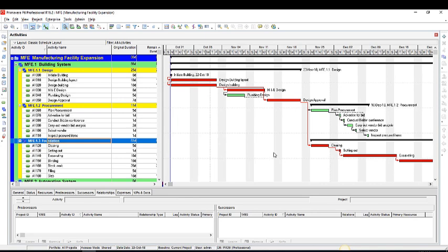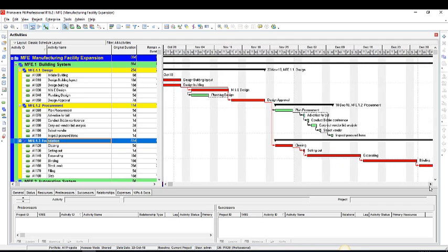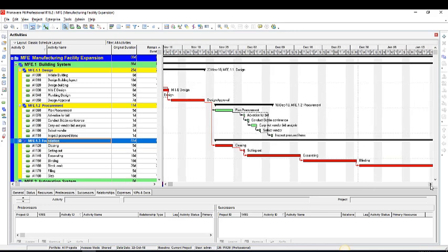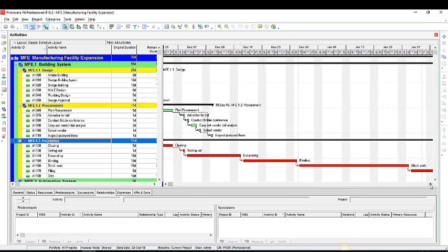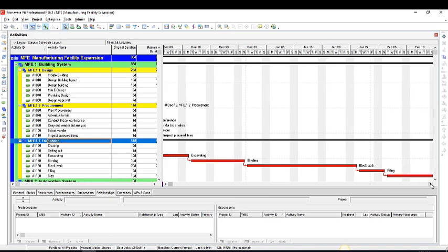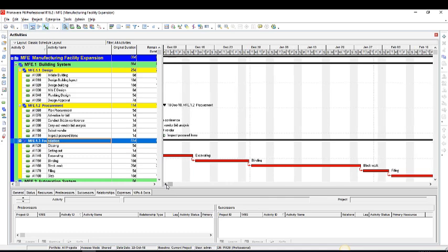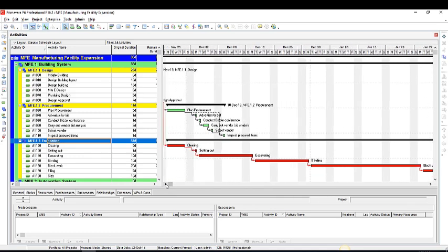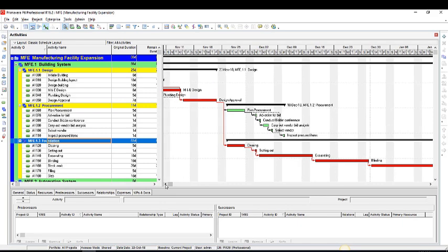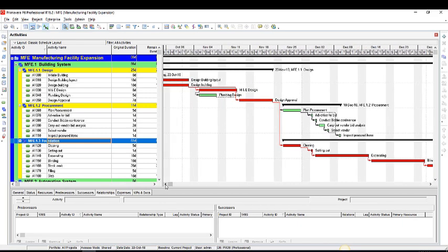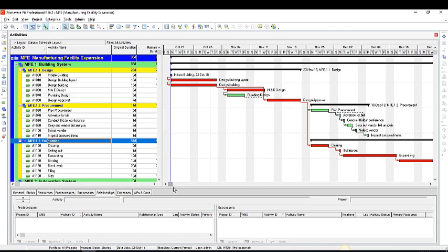So from what we have so far, you can notice that some activities are in red. These activities that are colored red are now the activities on the critical path. And critical path simply means activities on the path with the longest duration. And that's essentially what the critical path helps us to do. So it therefore means that these activities on the critical path, let's ensure we do not delay them, because they are the ones that determine the project duration. And if you delay any activity on the critical path, you would inadvertently affect the project duration. Another exciting part here is you notice some of these activities are in green.